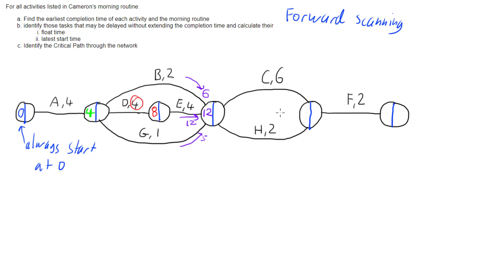Moving on, we look at the next node and do the same thing. Coming down from C: at twelve minutes in we can start C, add on the six minutes C takes, and that gets us to eighteen minutes. Looking at H: H takes two minutes starting at twelve, so fourteen minutes in we can finish H. We've got to pick the biggest number because it's the one that says when we can move on. So F can start eighteen minutes in, and after F is completed - which takes two minutes - we finish at twenty minutes.